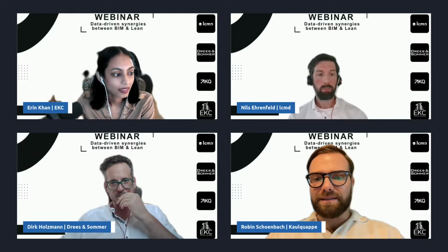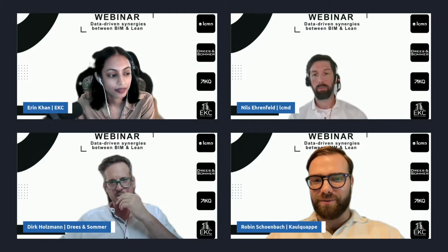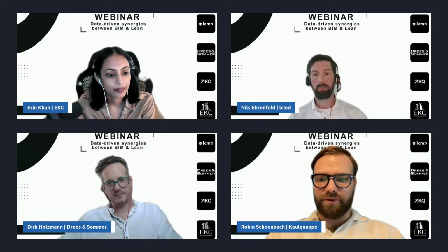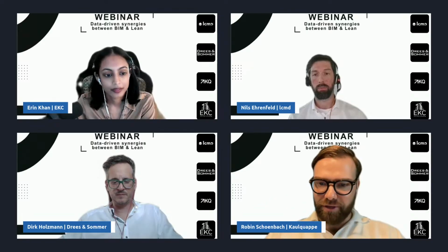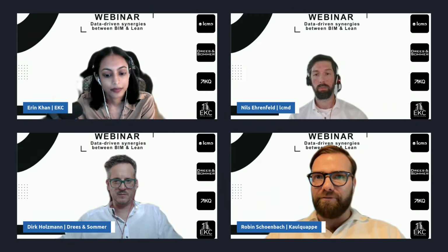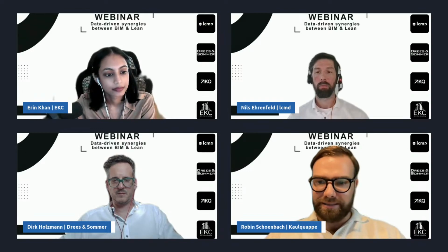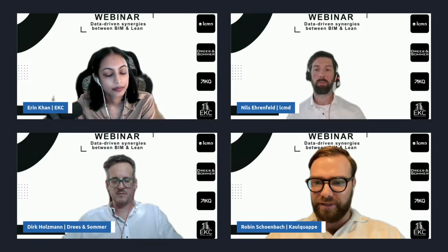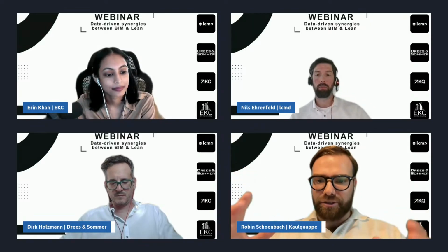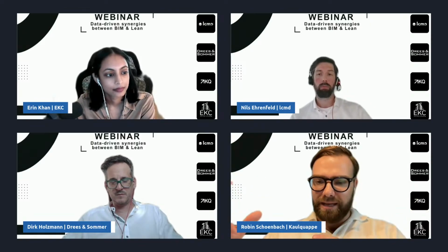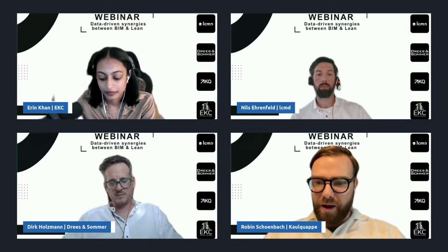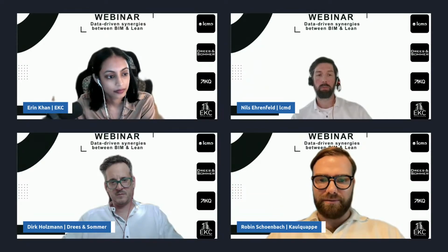Yeah. And people start talking about things. Because we have the visualization, we have reliable data out of LCMD, for example, integrated in the BIM models. So we go from a static BIM model to a dynamic decision-making tool. And people can talk in a lean meeting every second day, or maybe every day in the morning for 15 minutes, using the visualization and the process planning, talk about problems, go out on the construction site and solve them.